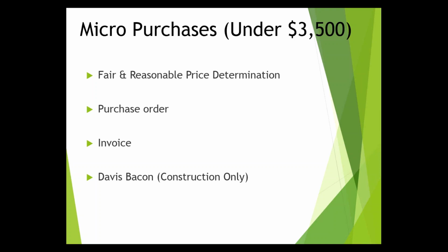So please don't send procurement documents for individual pencil purchases. That's the moral of this slide. Documentation requirements at the micro level are minimal, but they include fair and reasonable price determination, which is really throughout procurement. That's what we're aiming for: fair, reasonable, and open competition.